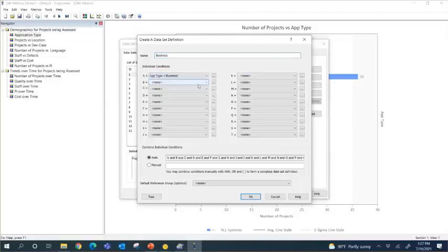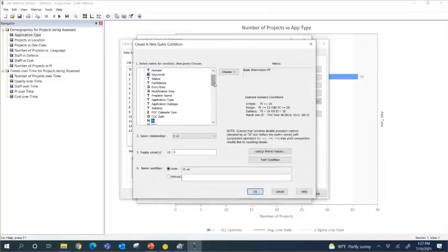We're going to create a business condition, and then take a look at just the business applications that have PIs greater than 20. We want to see the best. We want to see why those projects perform so well so that we can use that information the next time we have to make a decision. The PIs in the 20 range tend to be high performers.